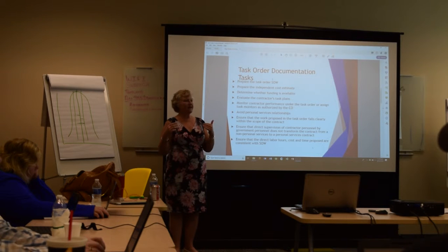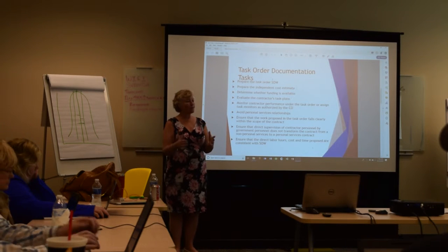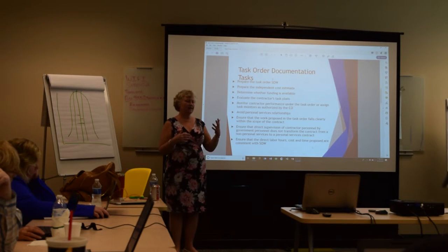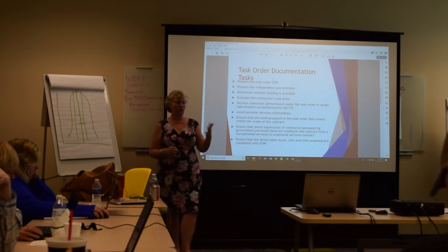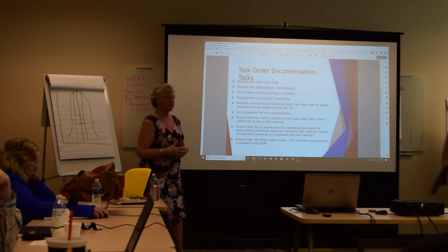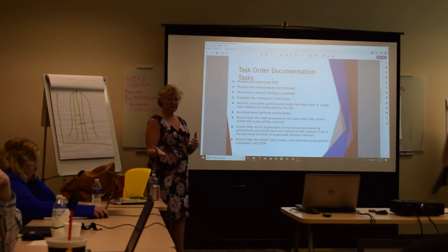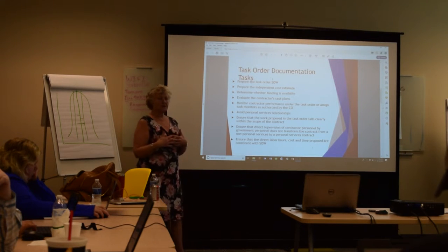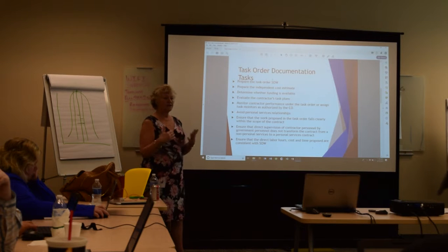So before they ever get your proposals in for this task order work, they should have said, oh, I think it'll take 5 systems engineer level 1 hours and 10 systems engineer level 2 hours, whatever the breakup is, and then multiply that times your numbers, so that when your proposals come in, they should be able to do a point-by-point comparison to see where you're off or they're off.